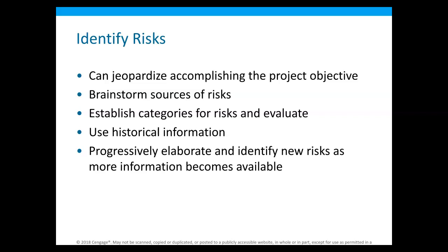So at the very beginning of our project, once we kind of have an idea where we're at, we typically have kind of a brainstorming session. And we start looking about what could be risks in that. So if I do that right now in here. So our construction project is to re-sheetrock and repaint this room and recarpet it. That's our project. What kind of risks could we have in there? So I'm going to throw them up on the board. What kind of risk could we have? We're going to paint. So we're going to patch the walls, paint, put new carpet in. What kind of risks do we have? What could go wrong?